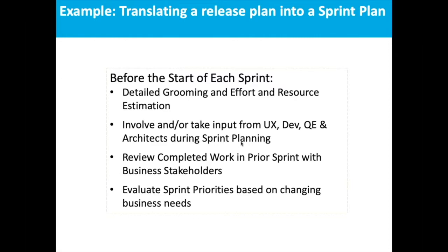So at the high level, when you went through identifying, working with engineering and identifying the effort estimate and the complexity as well as confidence level, it was really high level. You didn't have a lot of details then, and that's fine for that phase. But as you get to a point where you actually have to get these into sprints, you have to be able to get into the details and actually get into the nitty-gritties of how much is the effort, what are the types of resources we need, and how long is it going to take. You have to have that information before you can actually slot these things into sprints.